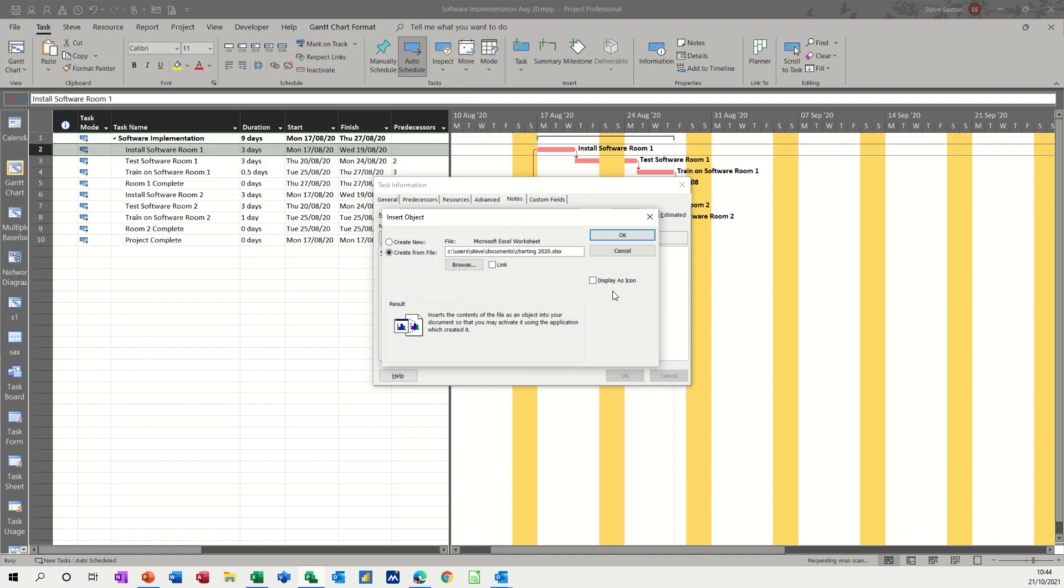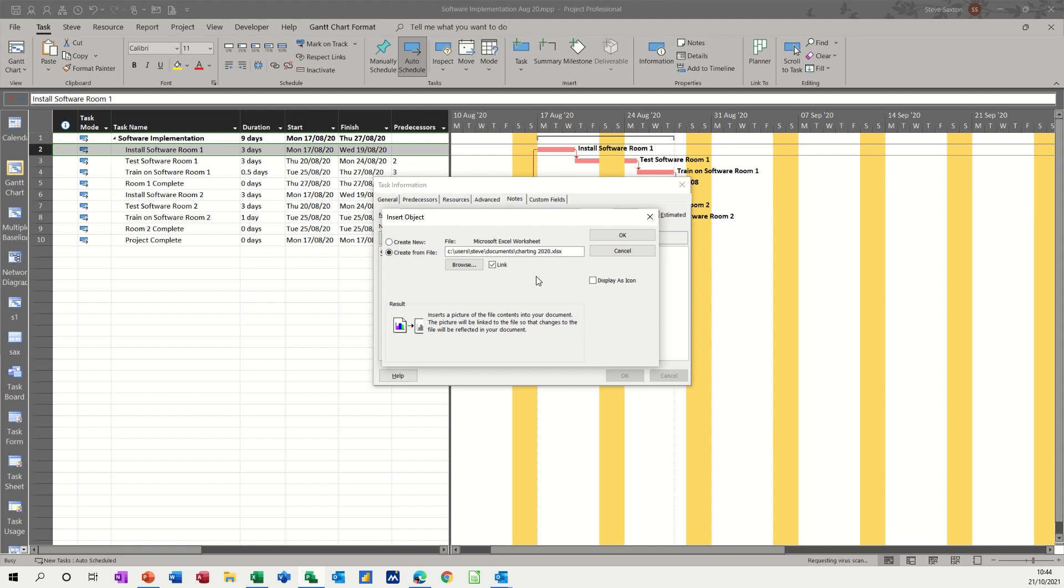Then I've got two tick boxes. I do want to do a link, which means basically I'll have a shortcut to that file in this task. The actual file itself will not sit in the task. And when I click that shortcut, it will actually open charting and I am editing the original. I also want to display as an icon. The reason for that is if you've got more than one file embedded into this task, you would have to scroll to the bottom of charting to find the next one, whereas if there are icons, it's like shortcuts on your desktop.